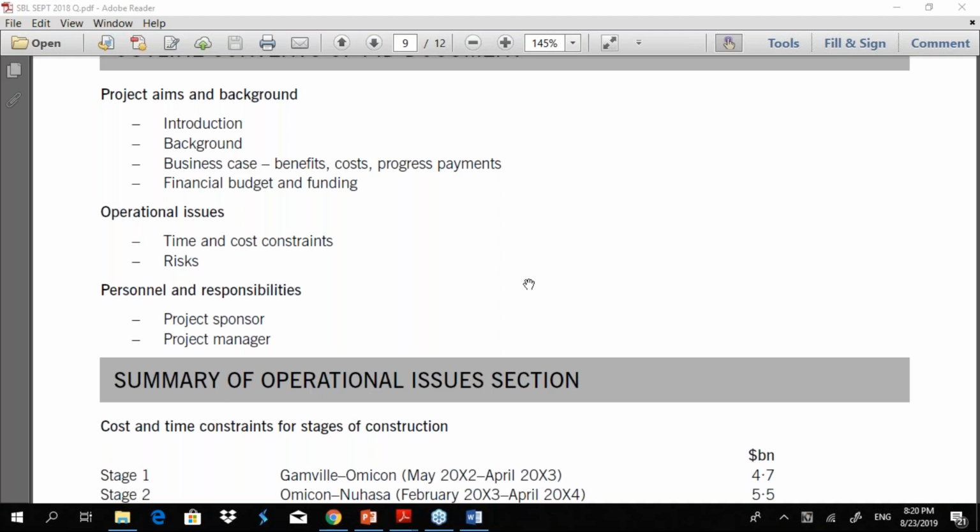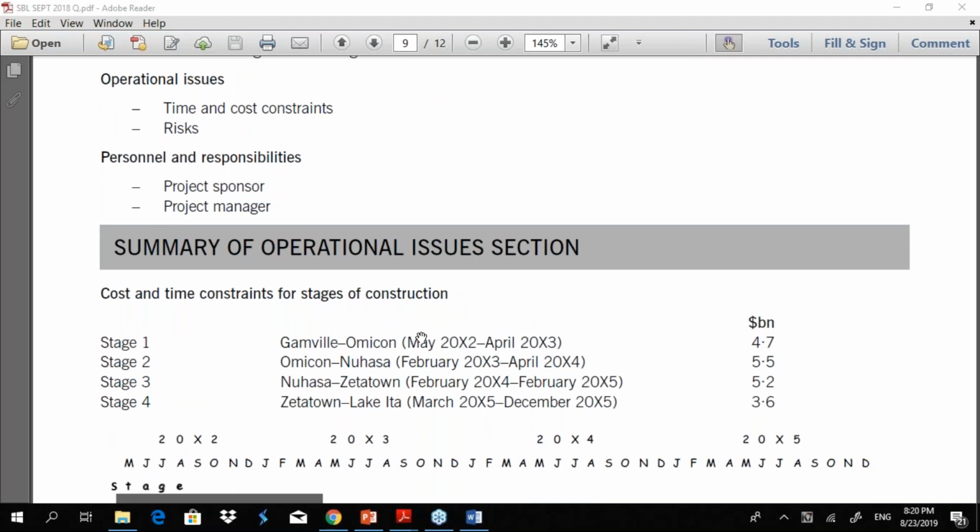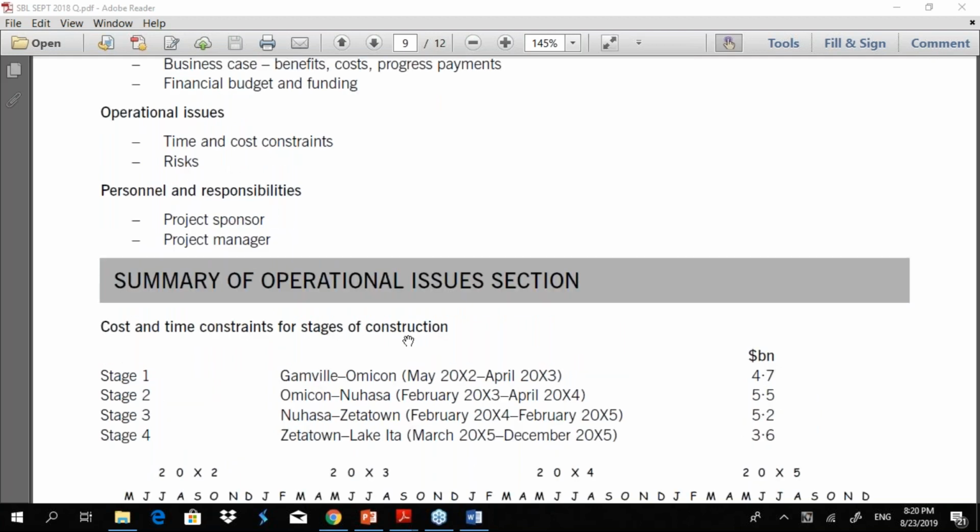Also, further factors to bring in are deadline details or different phases of the project, which can also be part of your timeline. And it should be with separate headings. Also, you must bring in the limitations that you may face. You're going to work on mountain terrain, so rainy seasons, how will that affect your work? If so, what kind of plans have you put in place?